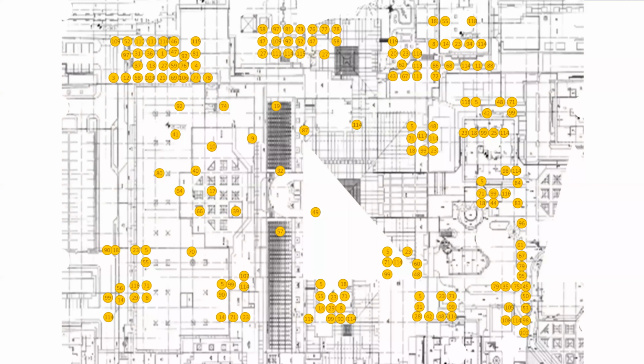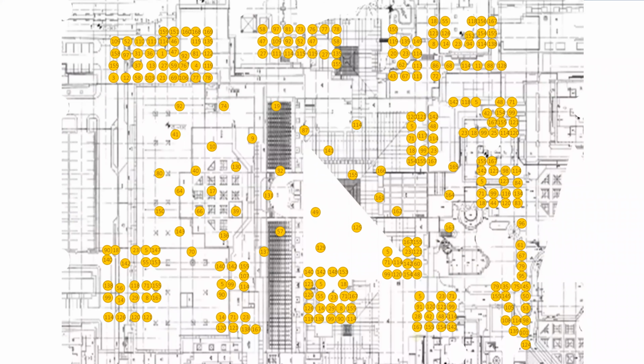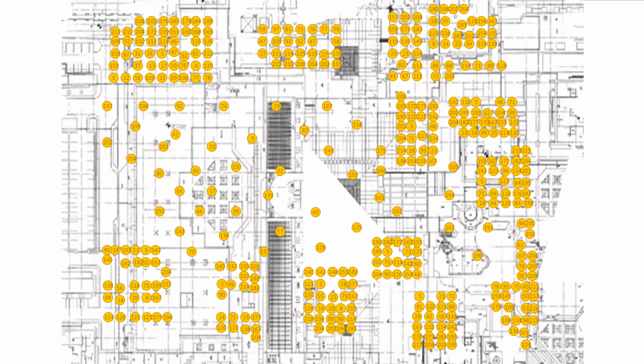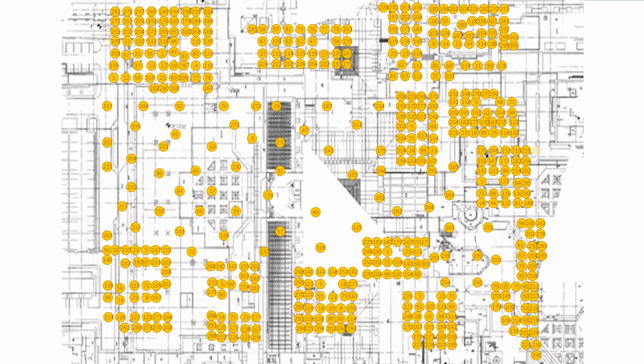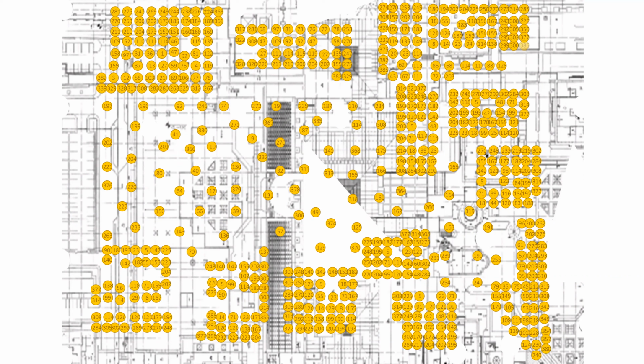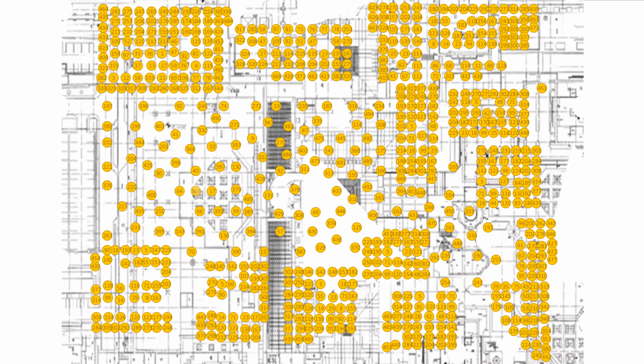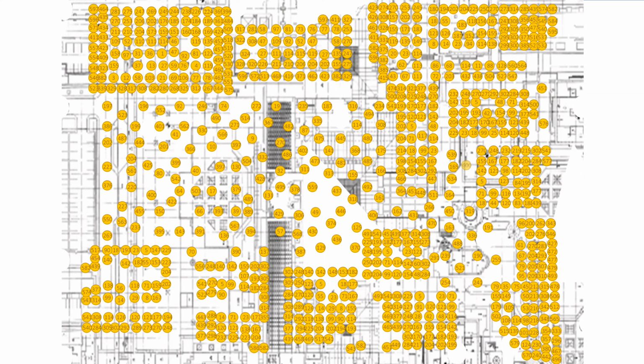This is an example from an actual project that we worked on a few years ago. These are all the changes that were proposed by the employer during just 1 year of this project. 750, a third of which was implemented. But even the 500 that were not implemented were disruptive. Contractors had to assess the proposed changes, they had to rope off given areas of the works in case the employer decided to go ahead with the changes. So all these proposed changes were disruptive.